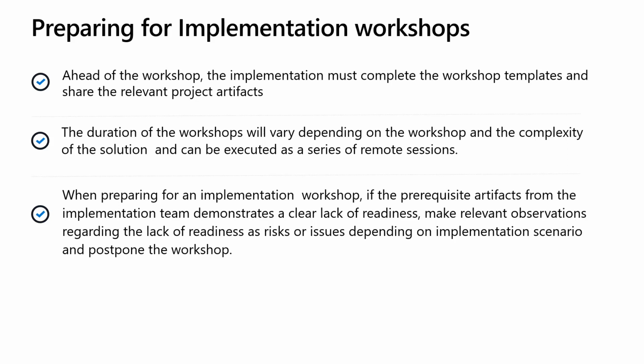In order to prepare for the implementation workshops ahead of time, you must have completed the workshop templates and shared the relevant project artifacts. The duration of the workshops will depend on the type of workshop and the complexity of the solution, and can be executed as a series of remote sessions. They don't all have to fit into one long session.